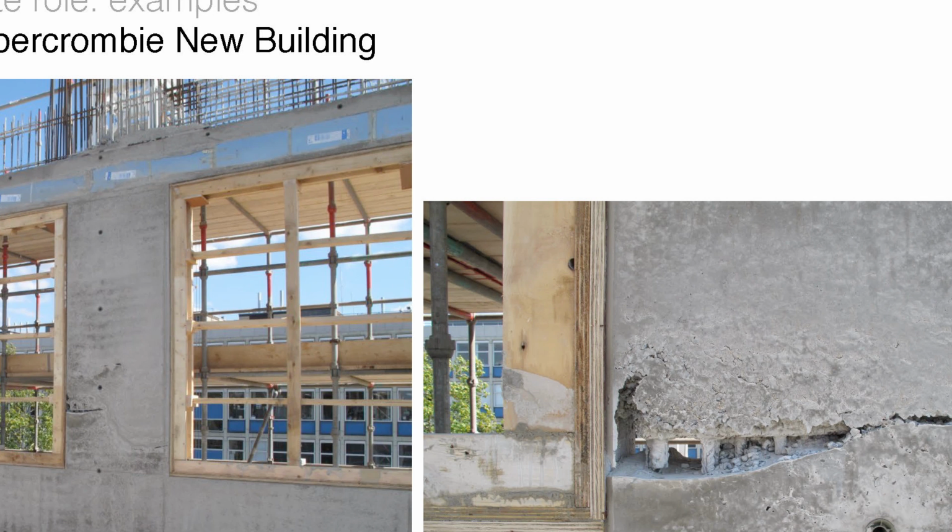So the guys have put up formwork, and within that truss you can imagine there's an awful lot of reinforced steel, and they've poured the concrete in. You can see where they haven't been able to get down with the pokers. They've obviously got to poke it down from the top, and they haven't managed to get the concrete to go around the rebar enough. In fact, you can see the Sinclair building straight through that truss.